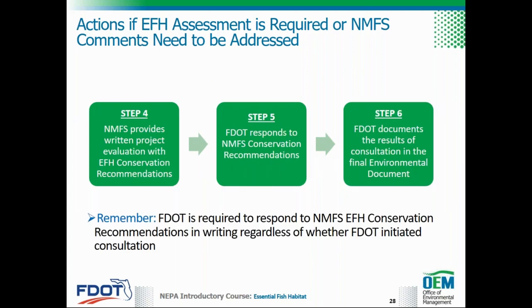Once consultation with NMFS has been initiated, the following steps should continue to occur during PD&E. NMFS will provide FDOT with a written project evaluation. This evaluation may include EFH conservation recommendations. FDOT will then respond to any NMFS conservation recommendations provided within the required timeline. FDOT then documents the results of consultation in the final environmental document.